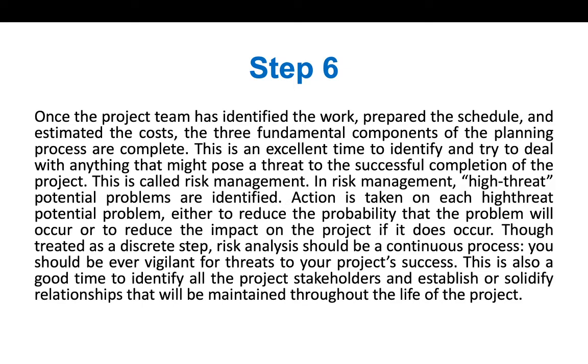So this was a very big risk for the project, because they have to complete the task in 6 days, and they were going all as per the schedule, but suddenly in the middle there were 2 days of heavy rain, and project work was stopped. So now they cannot complete the task in 6 days, and the cost will also increase. So in order to avoid this type of mishap, risk management is done.